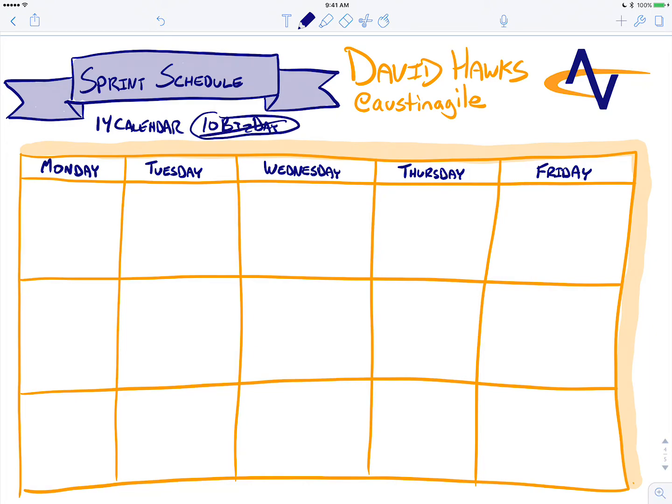Now, while that may seem like the same, what we really want to do is focus on having a consistent cadence. And if we plan on a Wednesday, every other Wednesday that we would do planning. If we do 10 business days, what we find is maybe you planned on a Wednesday and then you had a holiday, so the next time you plan on a Thursday and then you have another holiday, and the next time you plan on a Friday. And it keeps the team from having a rhythm and having a cadence. And as humans, we like rhythms. We like cadences.